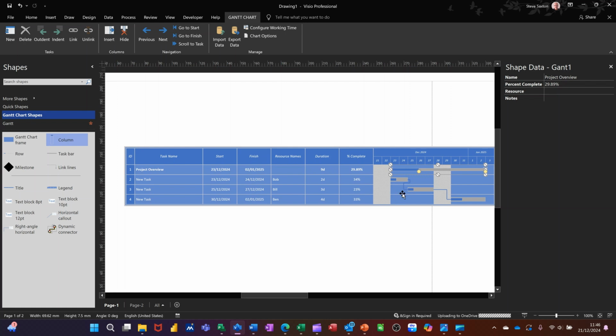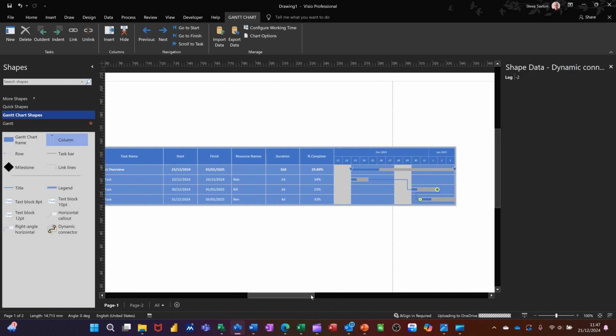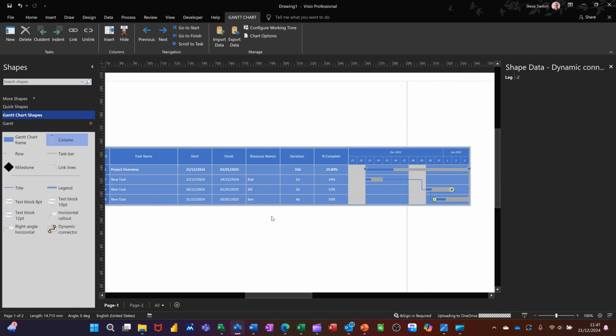If you actually click on the line, you can actually do lead and lag. So I've clicked on the line, you've got lag 0 days there. But if I put 3 there, see what happens there. 3-day lag. On this one, I click on that one and put a minus number in there. So -2, that's a 2-day lead time. You can see it coming back on itself there. If I move across a little bit, probably got too many fields in there now.